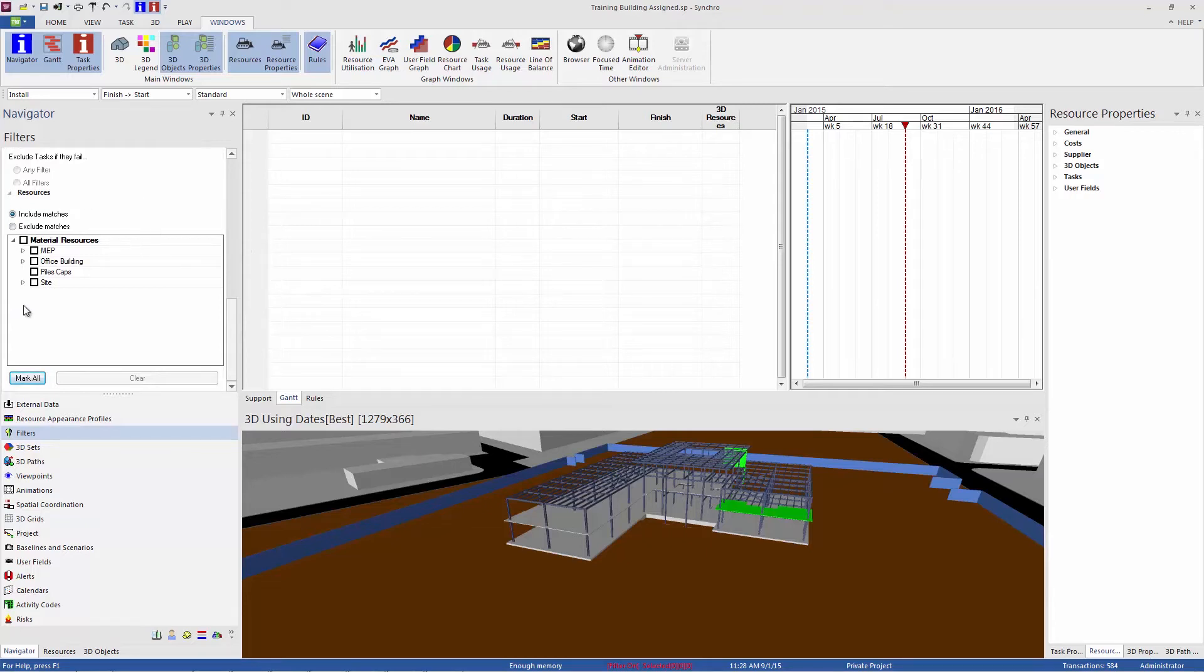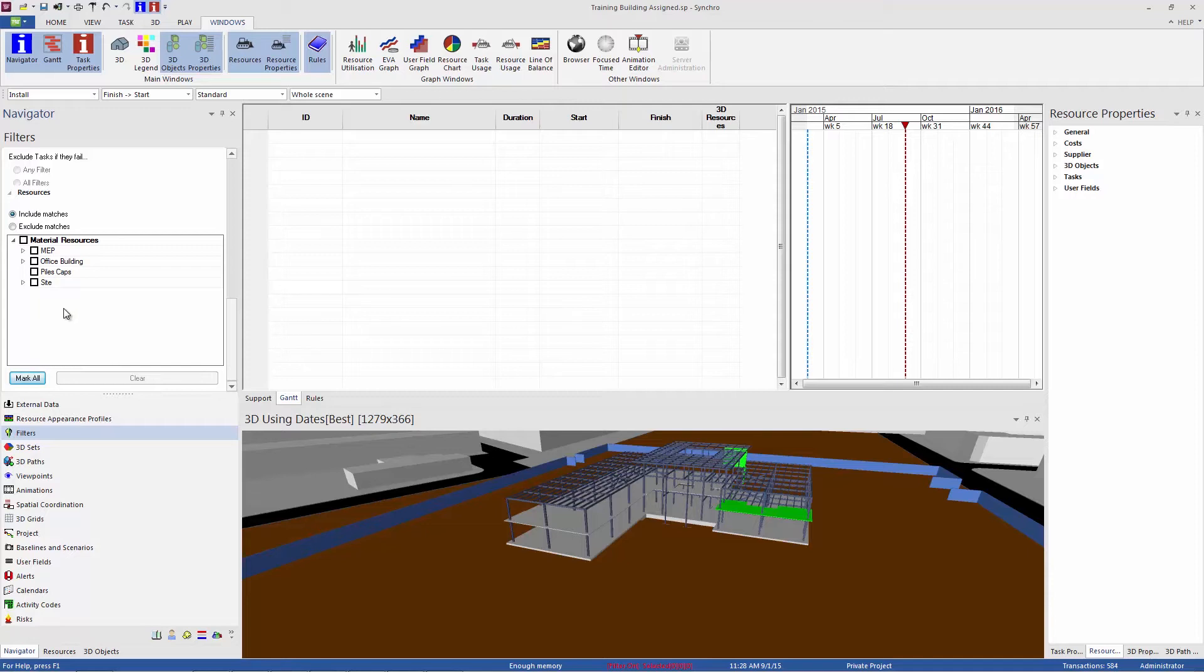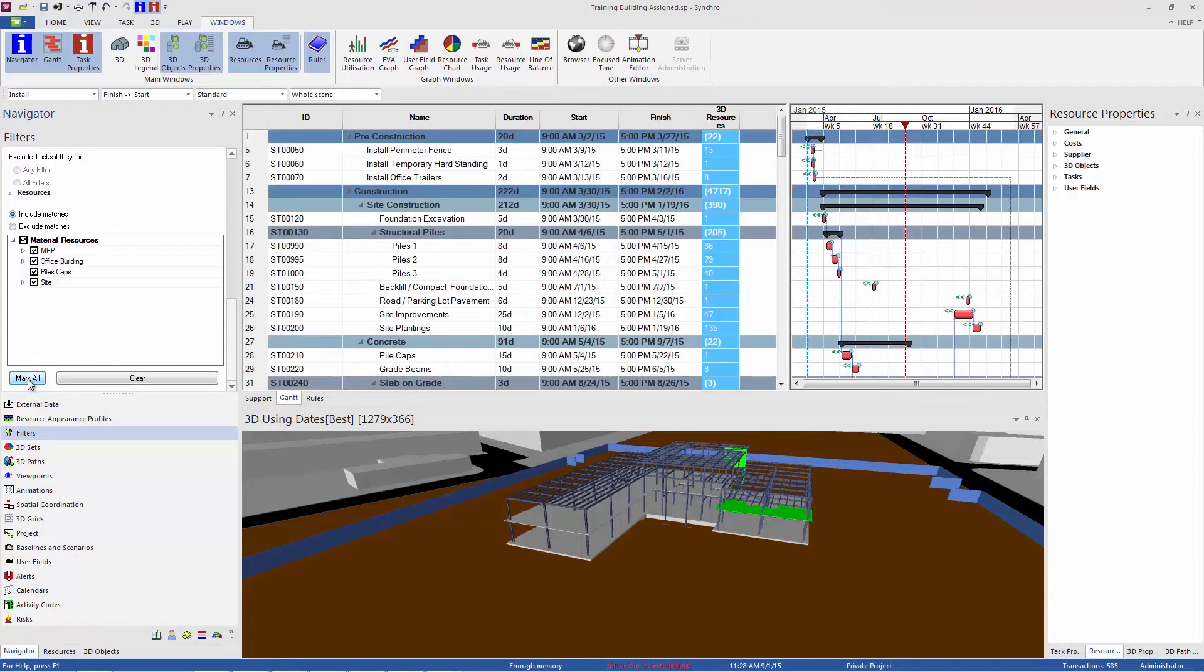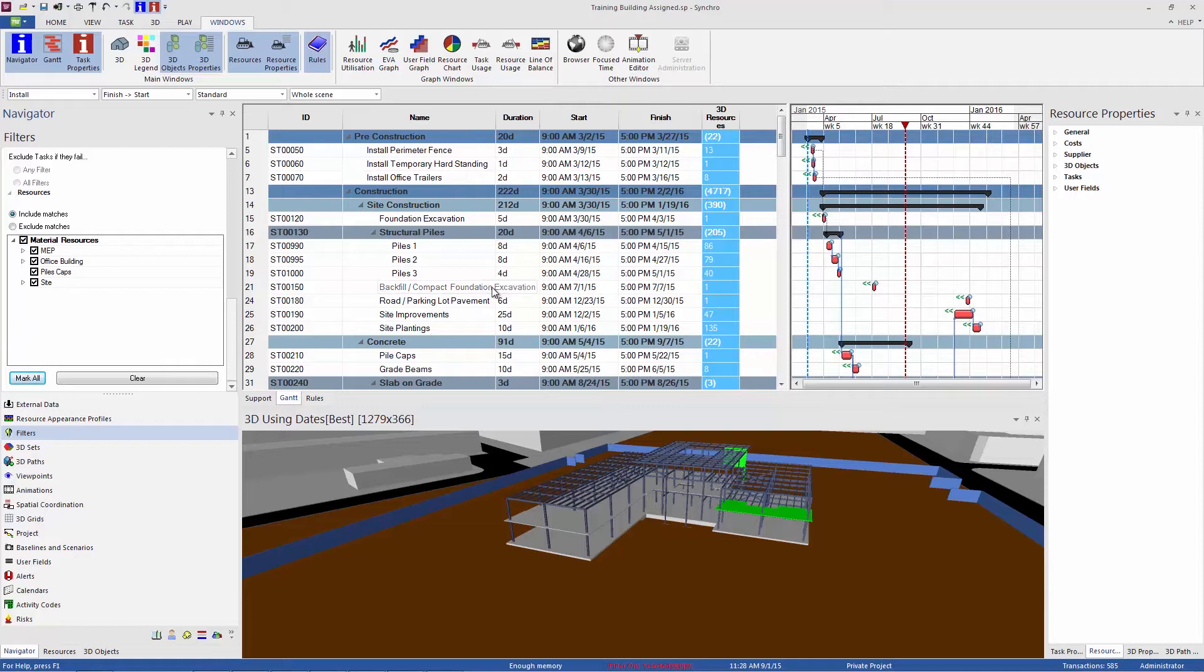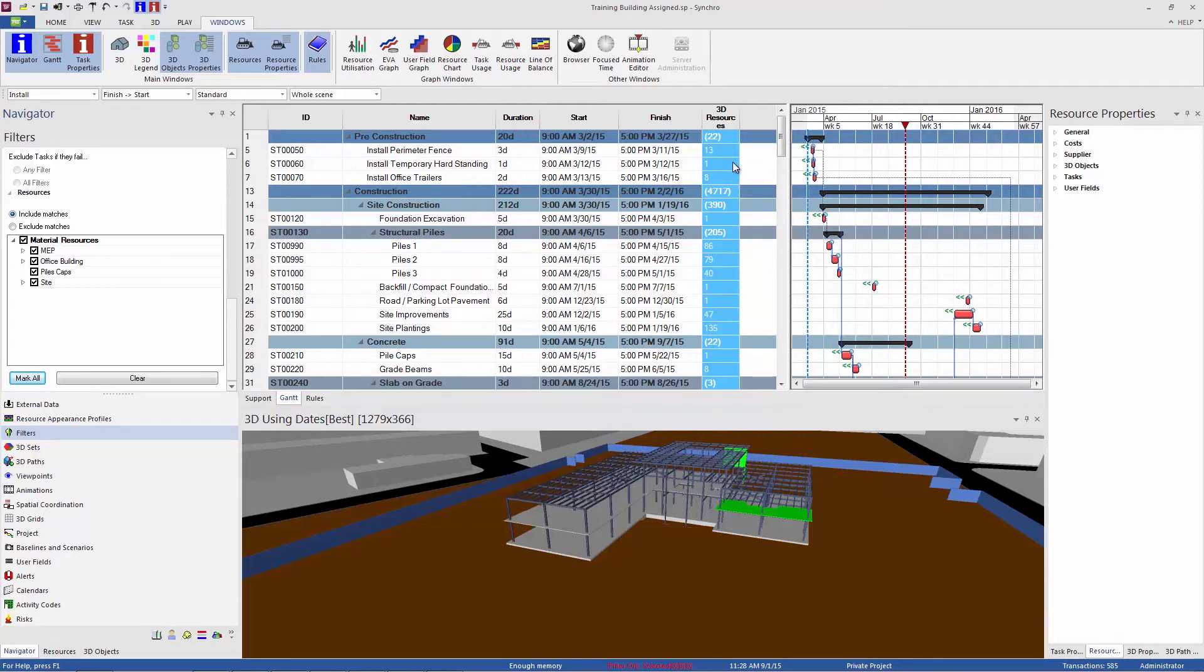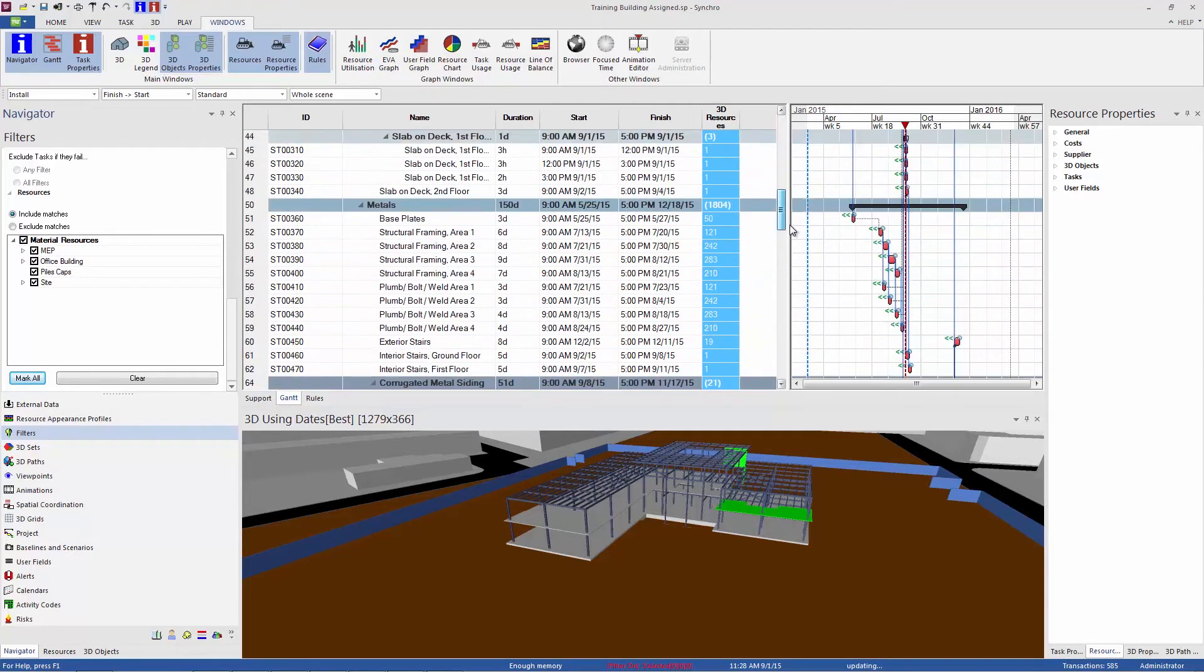And here are the resources in our project. This particular project has only 3D material resources, but if you had human resources, equipment, location resources, those would also be listed here. And what you can do is just check mark all. And this is filtering the task list by any task that has a resource assigned to it. So any of these resources, if they are assigned to a task, that task will show up here.